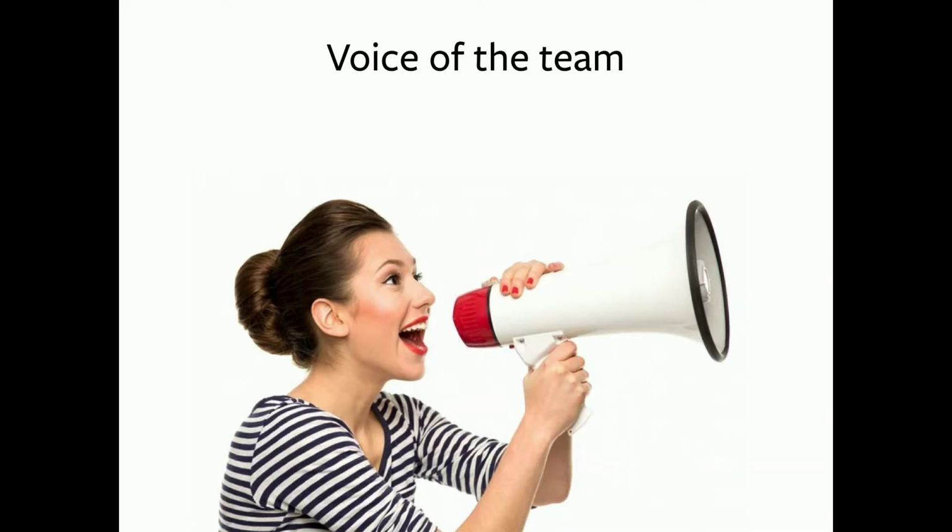Now, when you have a retrospective with the client, as a project manager, you're that voice of the team. So I like to meet with my team first and talk about, again, the successes and the pain points. And then specifically the pain points, let's talk about what we think could make that better. And so by coming to the client with my pain points and possible solutions, they're not going to be sitting here going, okay, great, you're coming to me with a problem, I have to fix it, I hired you. So you want to be able to do all of your homework and have this research and show that client that you are knowledgeable and that you know how to solve problems.